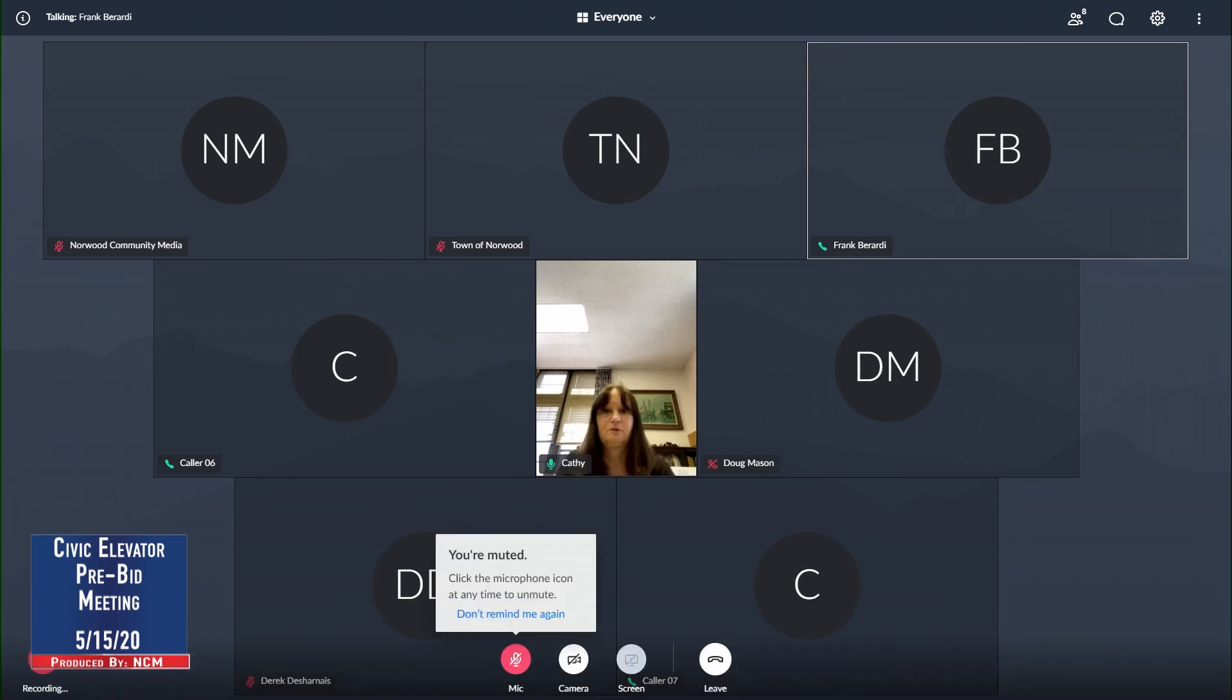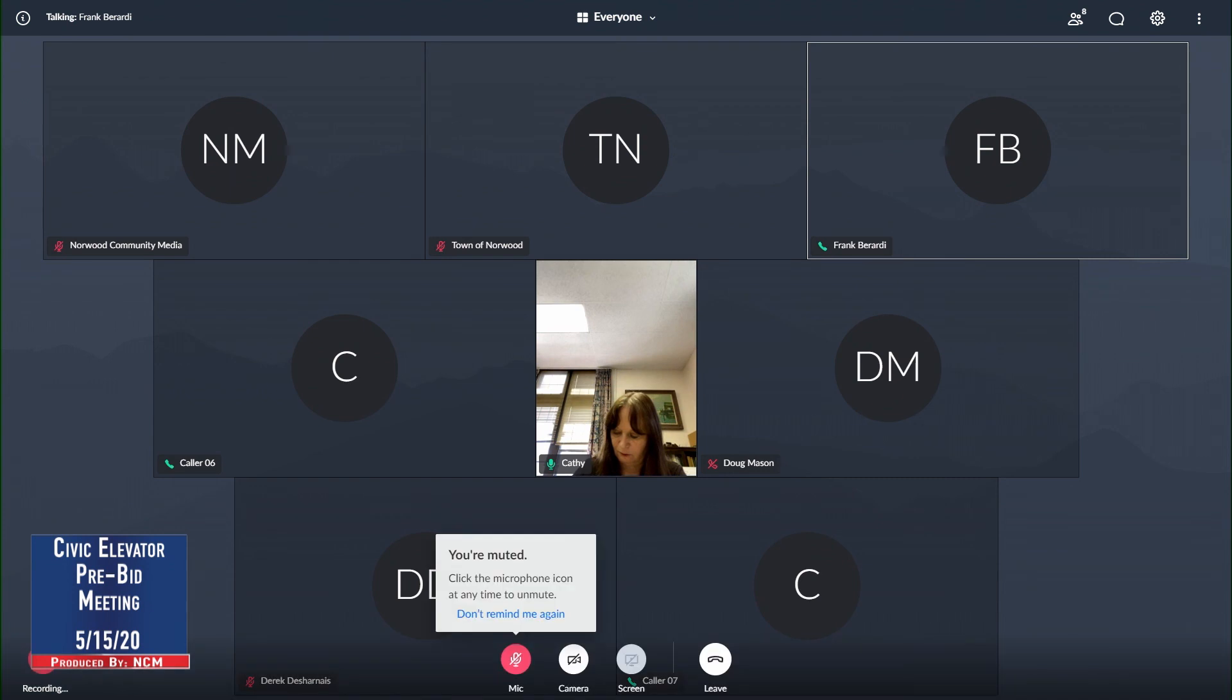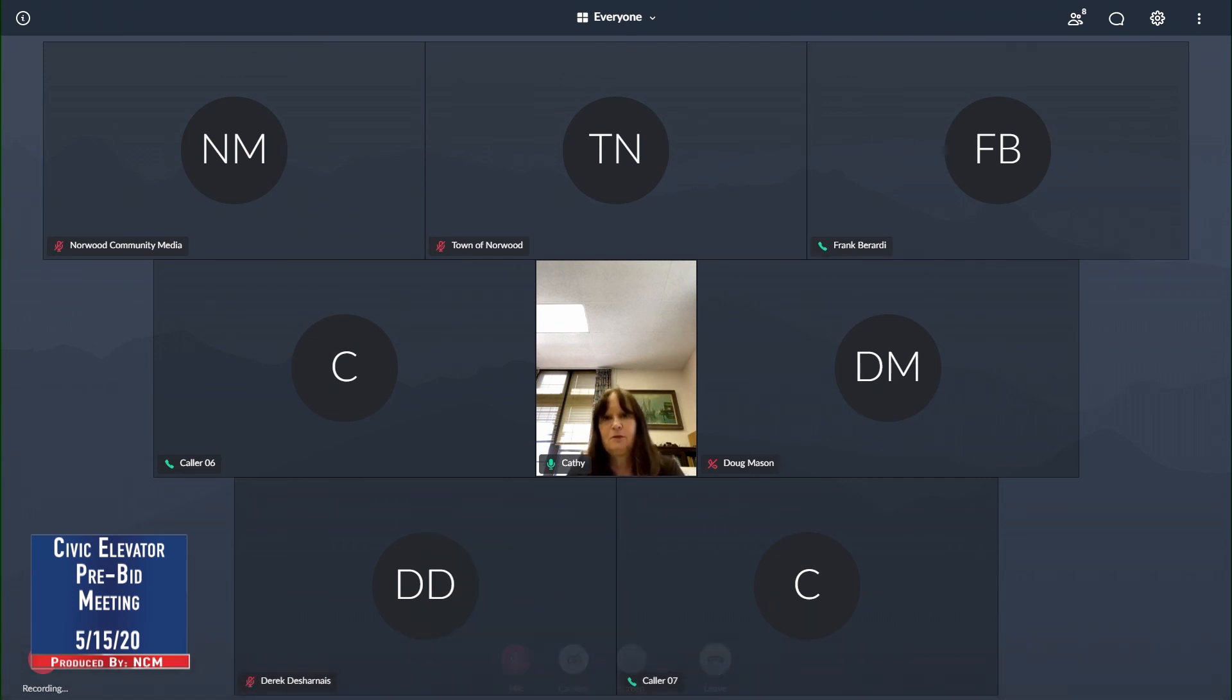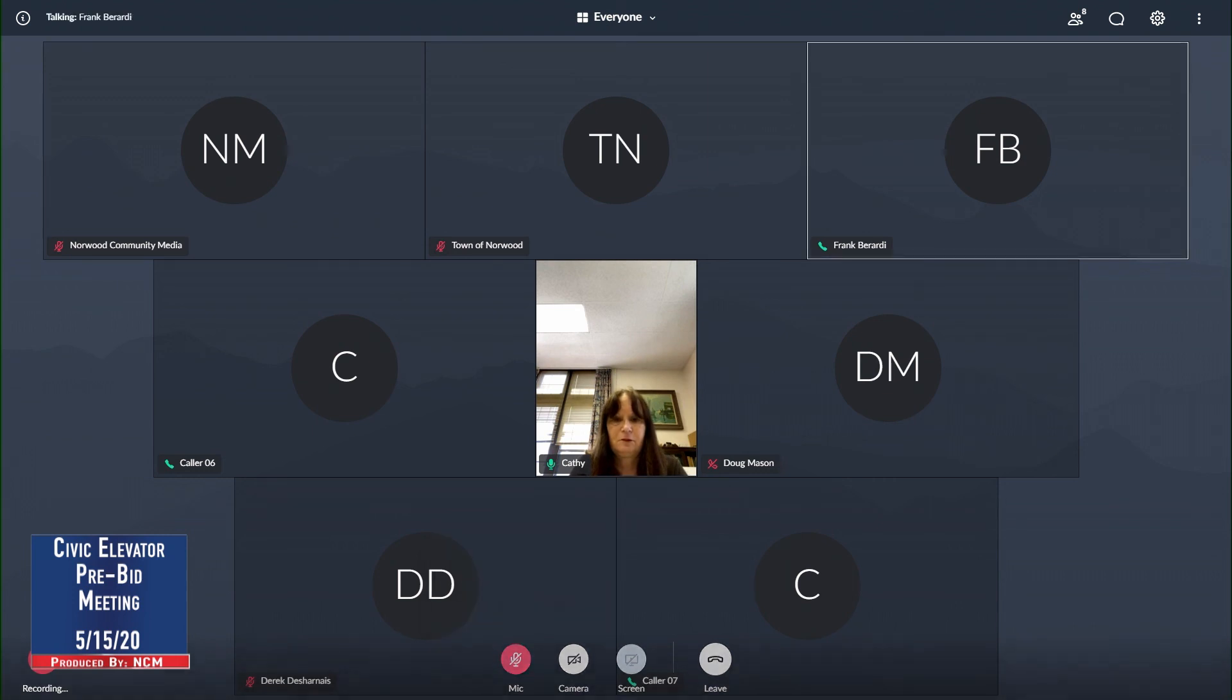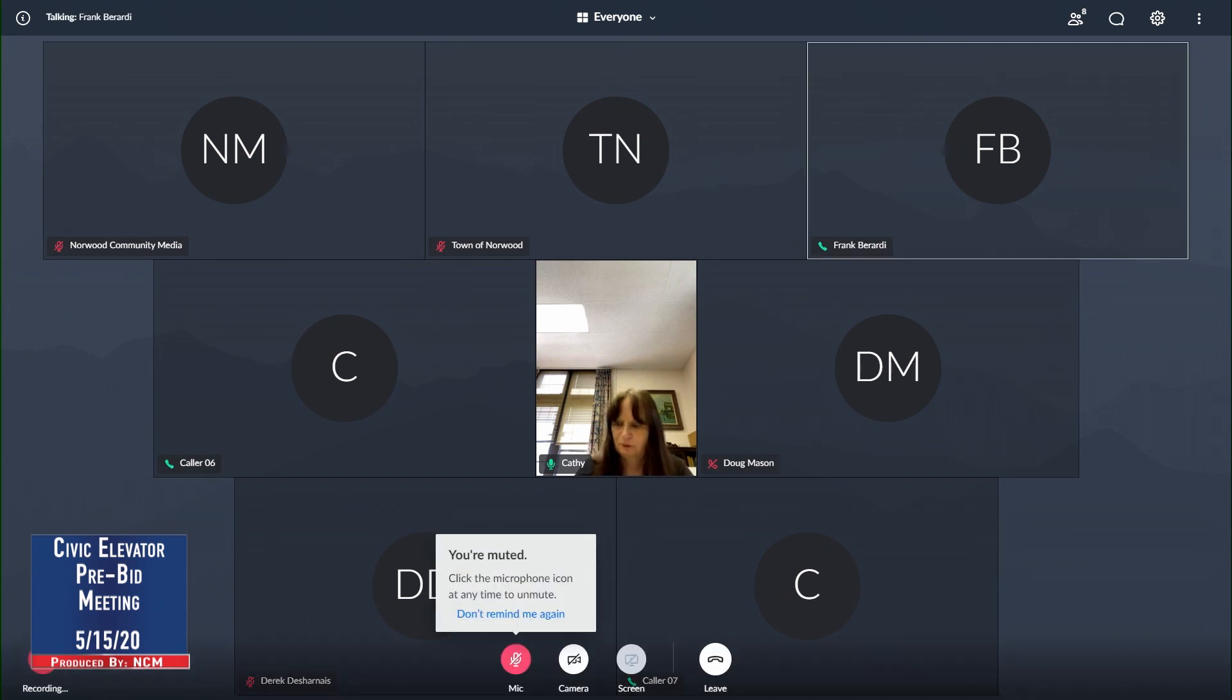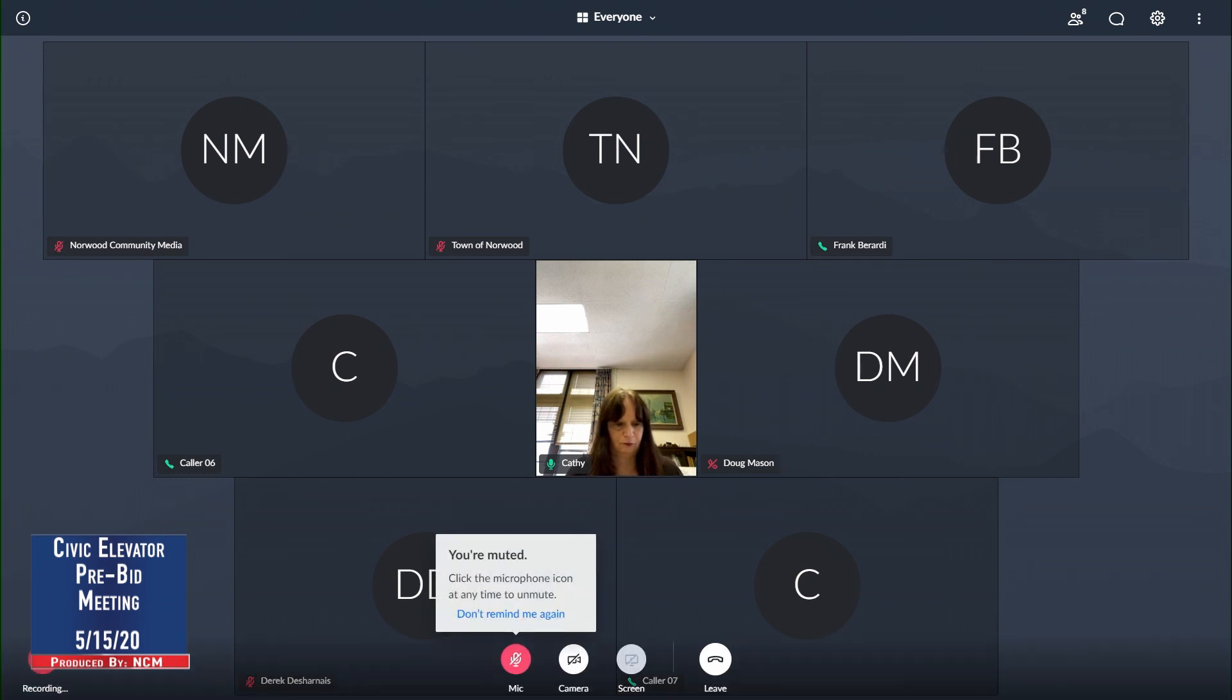We're going to have to put in an elevator recall system. We do have a current fire alarm system there, but it's only got one zone. So, right now, we're currently calling for an elevator recall panel and then tying into that zone. For cooling, we're calling for a mini-split system. Basically, what they have there is they have a little stairway that leads from the basement. We're looking to put it up above the ground on top of that there. You cannot penetrate the roof there, but you can go right adjacent down the wall and punch right through, and that will get you right back into the mechanical room. So, it's not that difficult to run to get there.